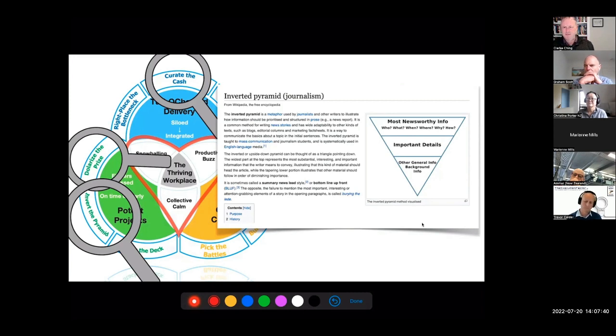we've got too many developers. Let's get them doing some testing. Or why don't we get them seeing if they can help the analysts work with the customer and offload some work from the customer so the customer has a bit more time to do the strategic stuff. Simple as that. Other times it's much harder than that. But for 90% of teams it's relatively easy once they get the idea, and it's the sort of thing that can take 2 or 3 weeks often, and suddenly performance skyrockets.